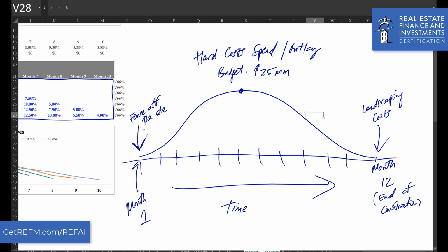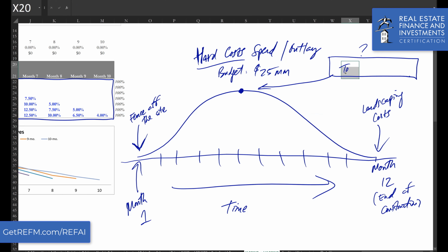And so the apex point in the construction process, topping out, right, the vertical structure, topping out of the structure. It's at that point that you have the most labor and labor trades and materials and equipment on the site at any one time.